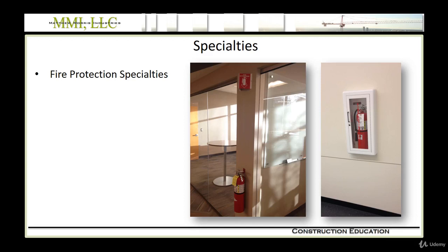Also, the height and the size of the recessed or semi-recessed cabinets needs to be coordinated ahead of time with the framer to frame out an opening. It would be really annoying to have to cut into walls at this stage of the game to install a fire extinguisher cabinet. The glass that you see in the cabinet is usually 1/8 inch float glass.